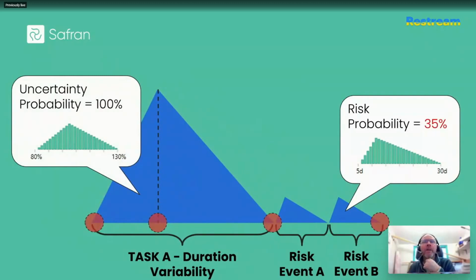And as you build up that more credible risk model and furnish it with the risk events, you should now be able to narrow your original assessment of the task's duration uncertainty, with the added benefit that once you've articulated a discrete risk event and understand its causes, you're in a stronger position to handle or respond to those causes with treatment strategies and tangible delegated actions.